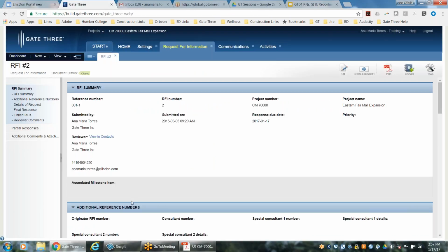It has been closed. In the event that the subcontractor Alfonso comes back to me and says, you know what, I'm still having a problem with that drawing, it's still not clear to me, you do have the ability of creating a new RFI linked to this one.